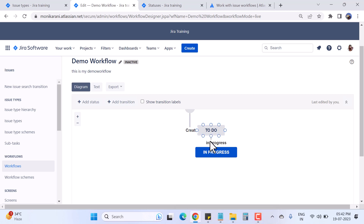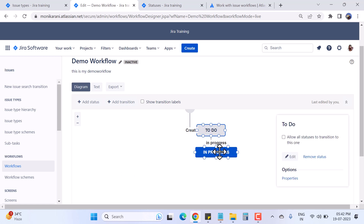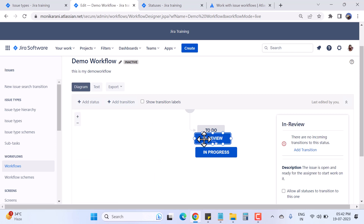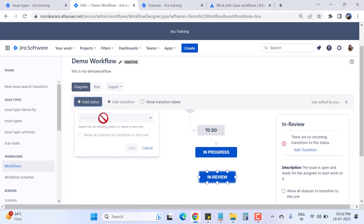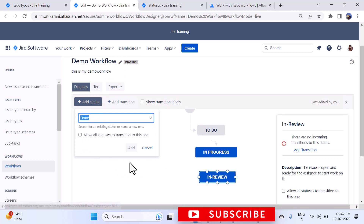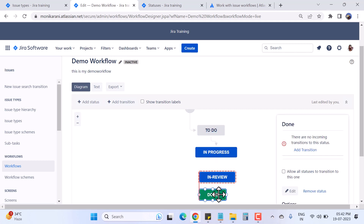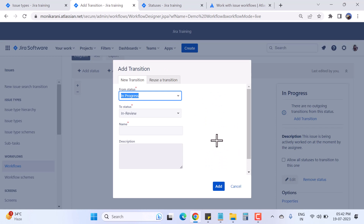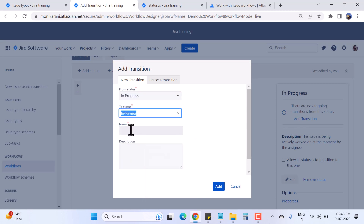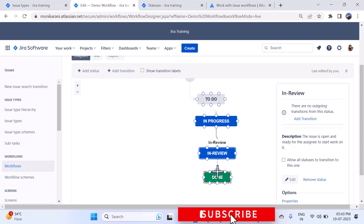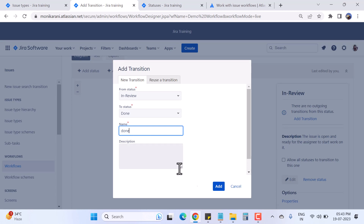Now I'll hide the transition labels for now. The first status is To Do, the second is In Progress. Let's add more statuses: In Review — drag and drop it here — and then Done. I click Add. To connect them, I add a transition from In Progress to In Review, give it a name, and hit Add. Then I do the same from In Review to Done.